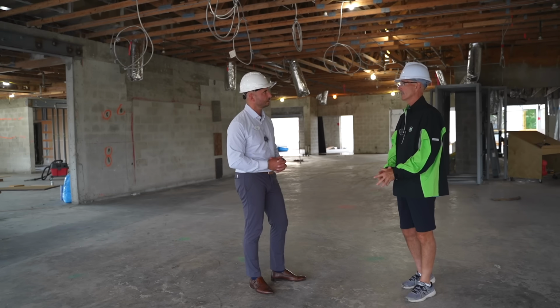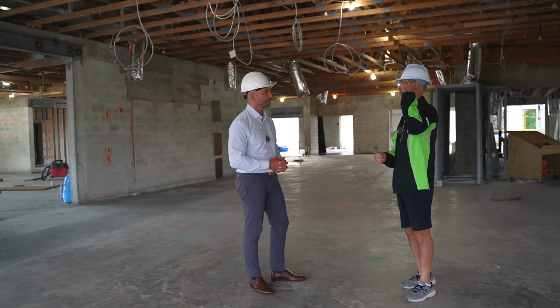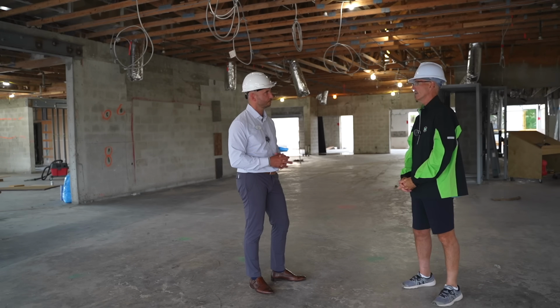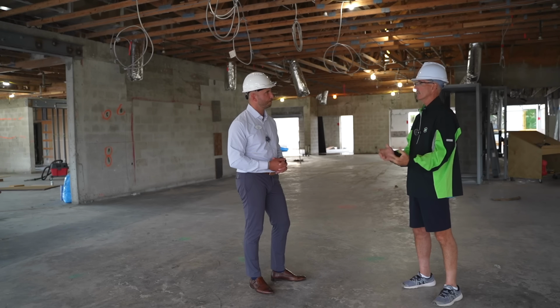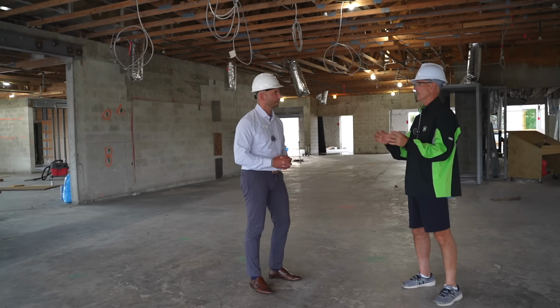The air conditioning equipment is in the warehouse of the contractor. As soon as the flat areas of the roof are done, they'll set the curbs, flash them in, and put the units up there. Rough them in electrically, and then they'll just wait for that November 1st, turn the power on, and we can start air conditioning the interior. Perfect. So that's a huge milestone for getting into the interior work.